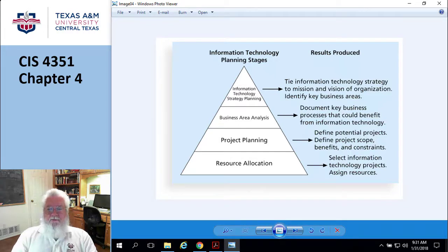Another one would be to put these things in categories. Like, which one of these is solving a problem? Which one of these is exploiting an opportunity? Which one of these is required by law? And so those maybe get into different categories. Let's say you had several that were fixing problems. Well, okay, then you could rank those in between. Here's several that exploit an opportunity that shows up. Well, then you categorize those.